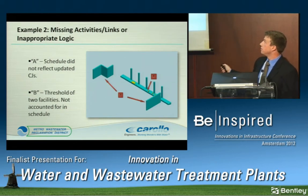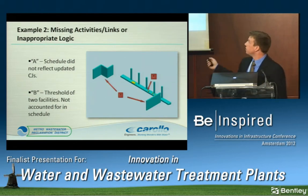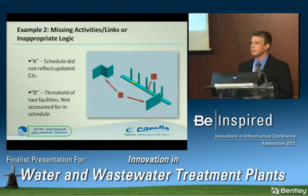But think about the work that it takes to build a little turn-down curb and then the columns on top. You're talking about potentially 28 days there. So we're talking about a lot of time in just a simple image that we probably wouldn't have picked up on until we got to there in the schedule.